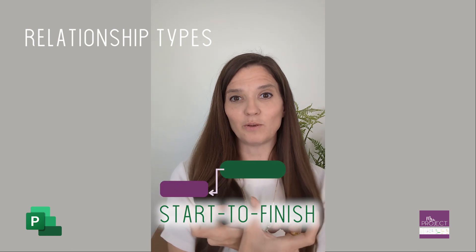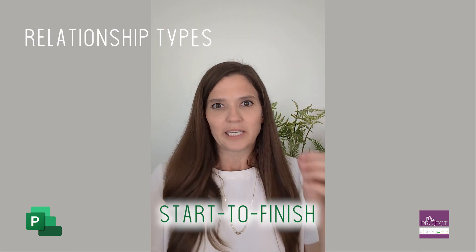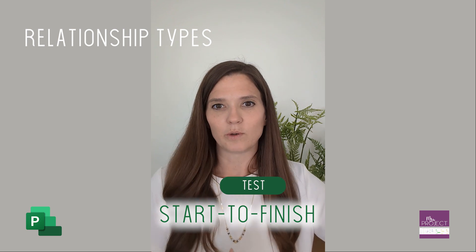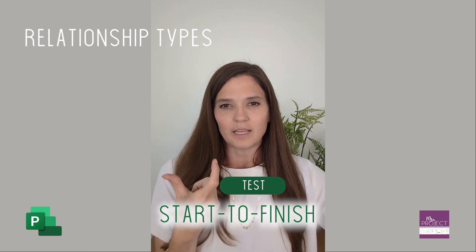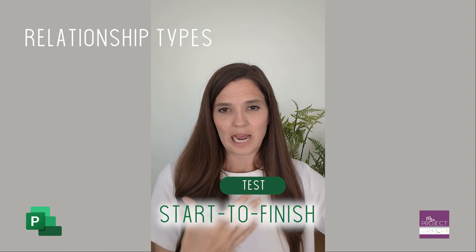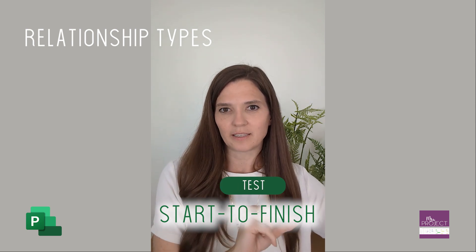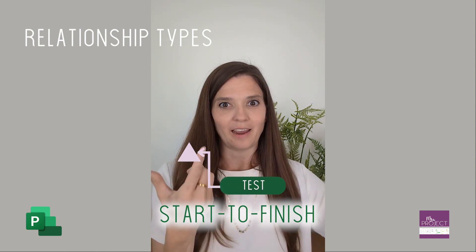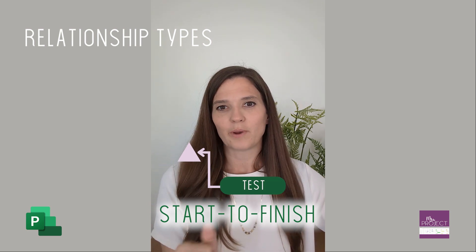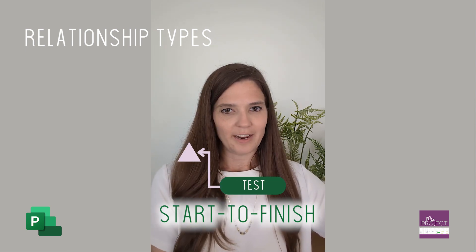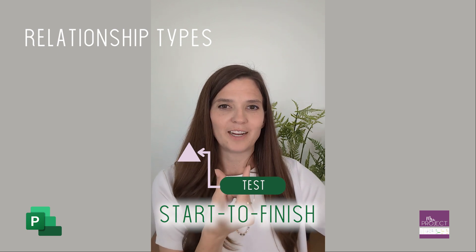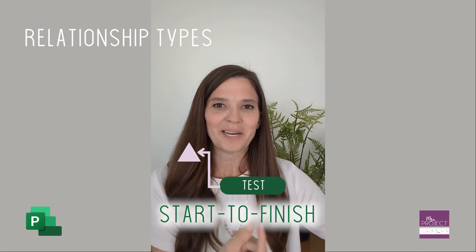Start-to-finish can be used with backwards planning. In the engineering world, you have test readiness reviews that have to happen a certain number of days prior to the test. You plan backwards — three years out or one year out you have to do this, 180 days out you have to do this. That's a backwards plan and you would use the start-to-finish relationship for that.